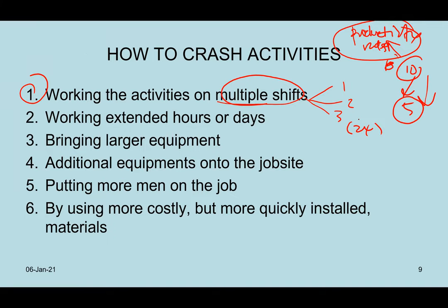simply due to the fact that heavy machinery is not allowed to enter during the day. They can only bring the material at night. And then to reduce the noise level, certain activities are being confined. So now you have to extend the working hours. If you do that on multiple shifts, for sure you can reduce the duration of the project.